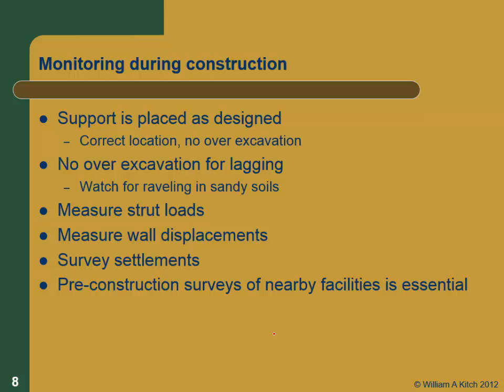The second person you can be working for is the owner of the new facility, who doesn't want the person in the other facility to make false claims. And so they want to go out and pre-survey those facilities to make sure that everything is already documented. So when the guy comes in and says, "Hey, man, I got these cracks all over my apartment building," they can say, "Hey, we surveyed this beforehand. Those were there already."